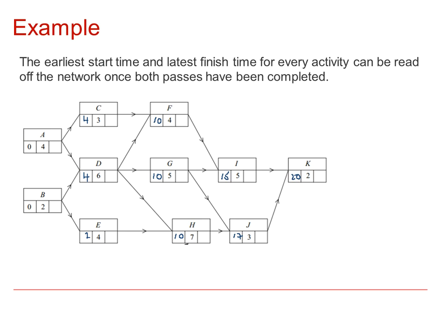20. Now it's possible that we don't actually need an end here, but because there's only one arc, K is in effect the end, but you could put an end point in if you wish. The activity has 0 duration, so the earliest you're going to get to the end is going to be the 20 plus 2, which is 22.